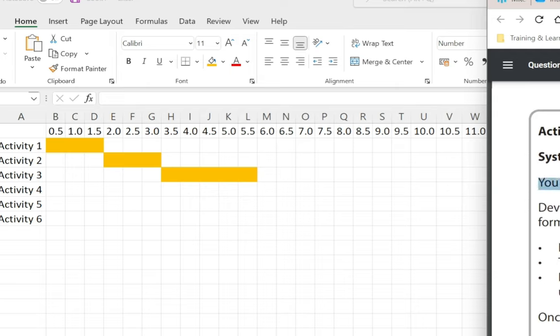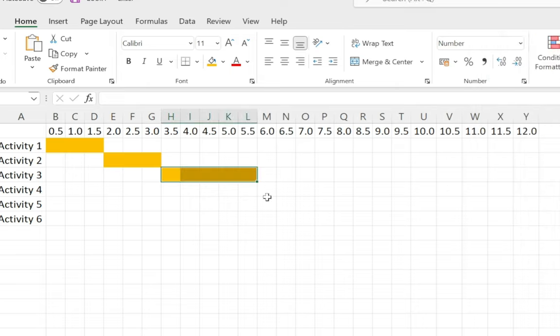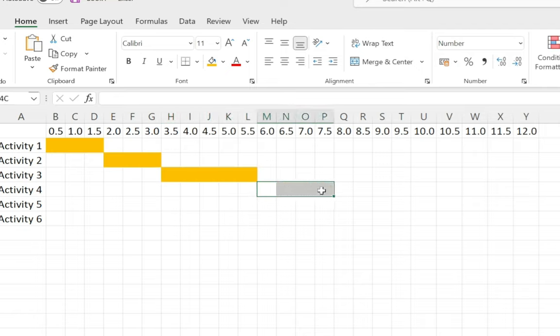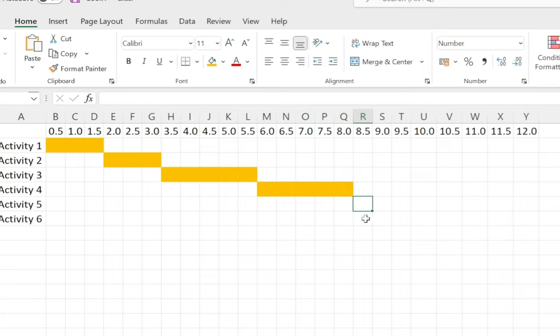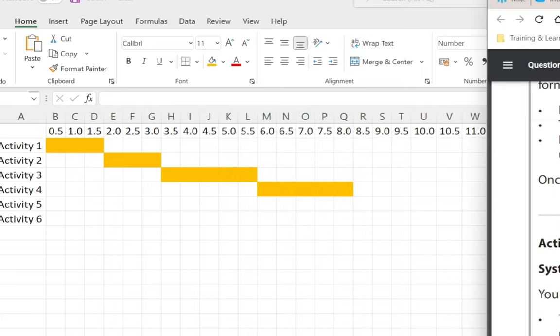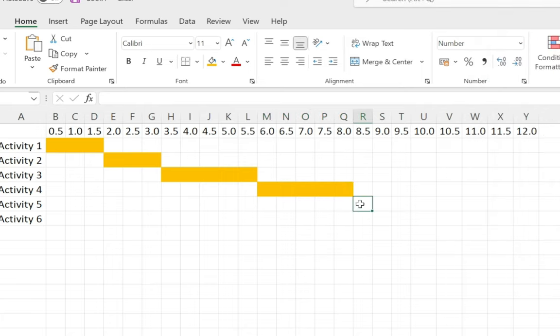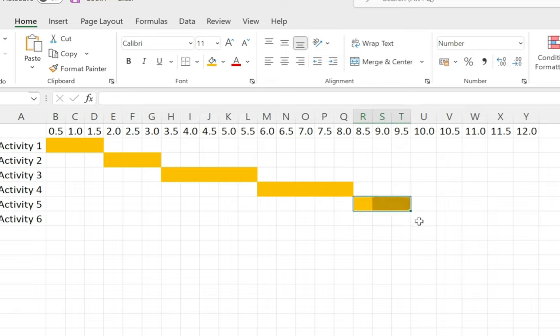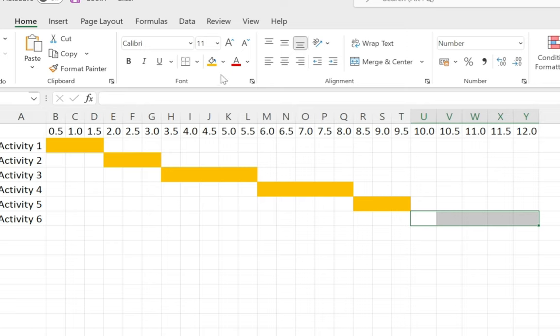Activity 4 is going to be 2.5 as well, so that's one, two, three, four, five. Activity 5 is going to be 1.5, so that's three. Activity 6 is going to be everything that's left over, which should be five. This is my Gantt chart completely finished for the initial plan.